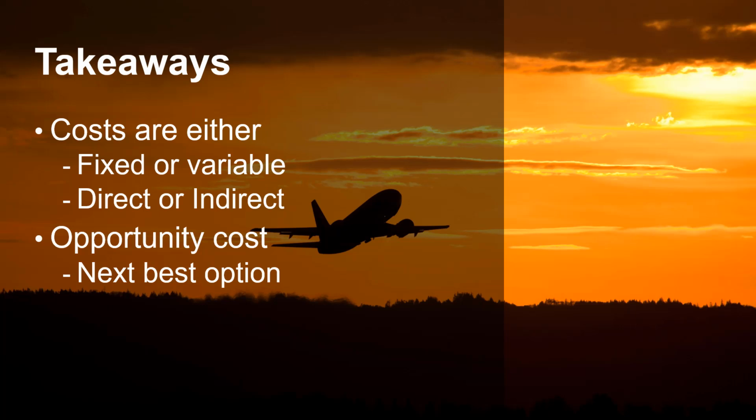You are looking at 2 different, mutually exclusive options, and which has the best value. Money does not necessarily change hands. The opportunity cost helps you determine which option is best. It could be that a project is in trouble. Maybe it is over budget, behind schedule, or both, and you are looking at options. Calculating opportunity cost helps you make the decision.